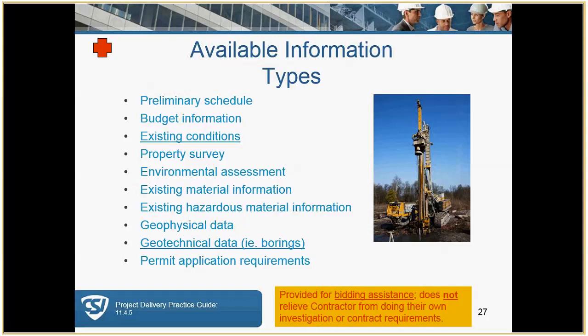And keep in mind, do not accidentally place information here that may be critical to include in the contract, like a very specific phasing diagram that you agree to with the owner, rather than just a preliminary schedule. A preliminary schedule is to give the bidders an idea of what the schedule is going to be. The contractor is going to end up providing a particular schedule. You may have in the contract documents themselves a due date, but how you get there may be just suggested. But if you have very specific requirements, you shouldn't be putting them here. You should be putting them in the contract documents.